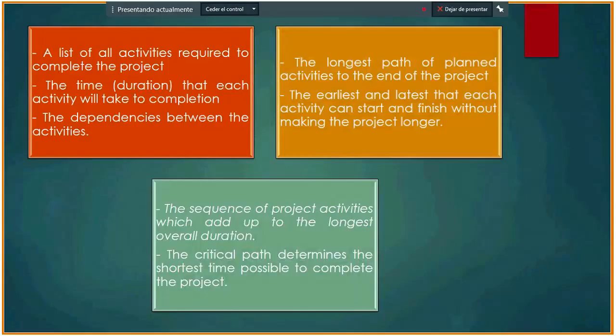This process determines which activities are critical, i.e. on the longest path, and which have a total float, i.e. can be delayed without making the project longer.